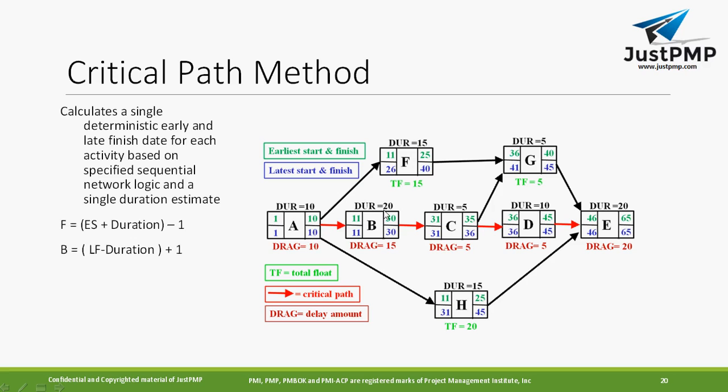Now see, first you need to calculate the earliest start and finish date. Second, you need to calculate the latest start and finish date. First you need to calculate this part, and then you need to calculate this blue line, right?